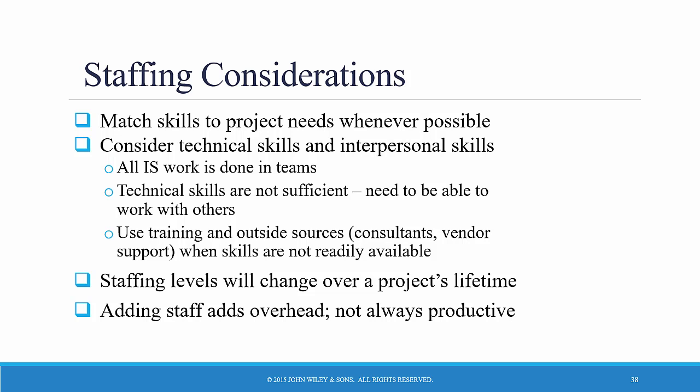Once the project manager understands the optimum number of people for the entire project, he or she can create a staffing plan that lists the roles required for the project and the proposed reporting structure. You need a balance of technical people — programmers, database designers, and that sort of thing — and business analysts who better understand the business requirements of the system. You don't want a completely technical team, but you certainly do need some technical people on it.